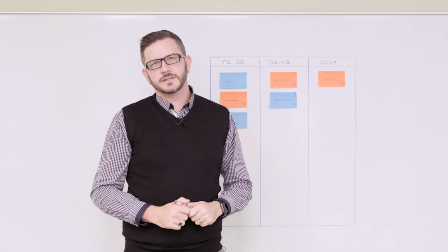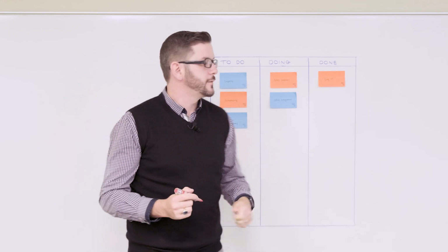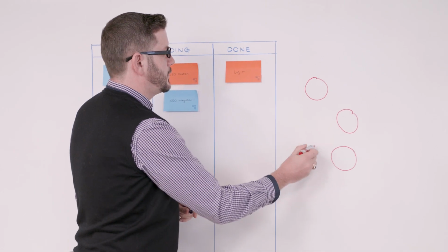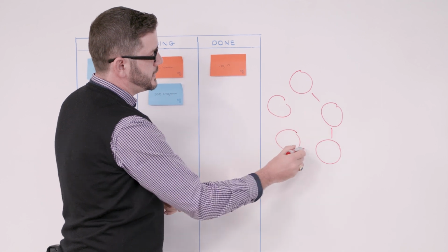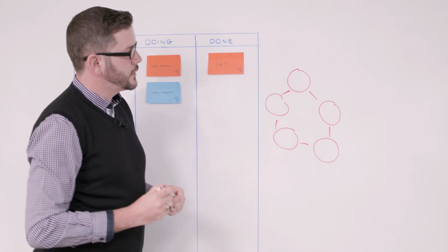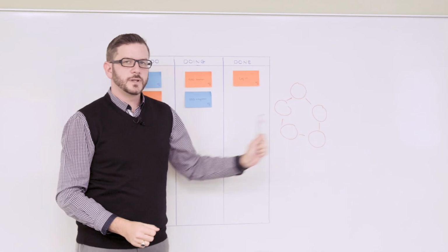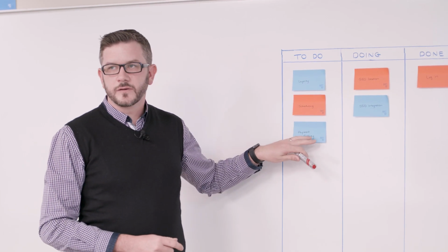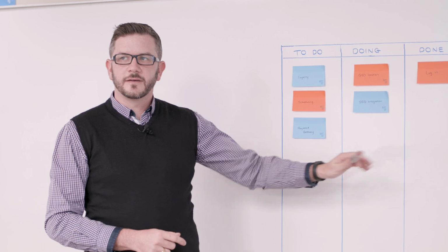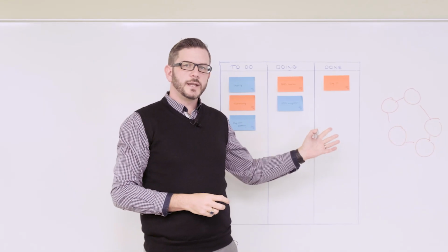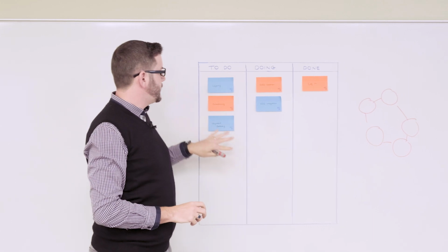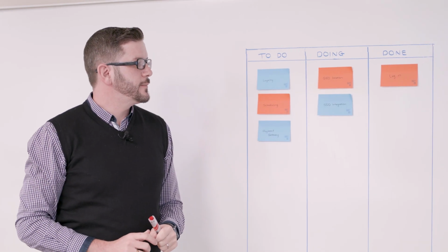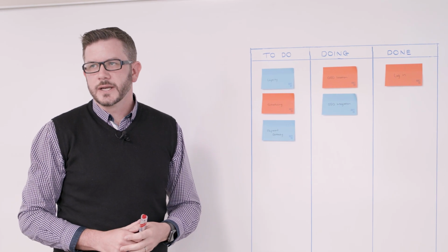When you're using any of these methods, there are a few things you need to be aware of. When we're checking on yesterday's weather, we're having a conversation among the team. So every single team member will talk about what they achieved yesterday, what they're going to do today, and what's blocking them. The danger with this is that we might miss out talking about a story that's on the board. You might not have talked about a certain story because it's currently blocked and someone might have forgotten to mention it. If you're running this format, you want to make sure that your Scrum Master keeps track of all the items on your Kanban board in order to make sure we don't miss out on any.